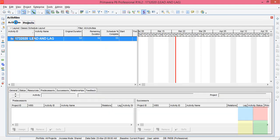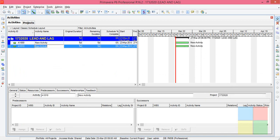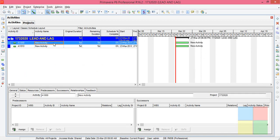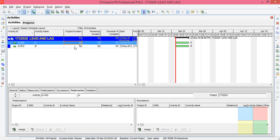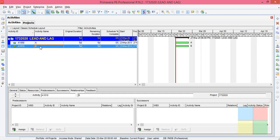I'll go to Activities, add two activities. Rename it to A and B, and the duration be five days, five days each. The software doesn't know which activity should start first and which should start next. So I'll highlight B, assuming that A is the previous activity of B.